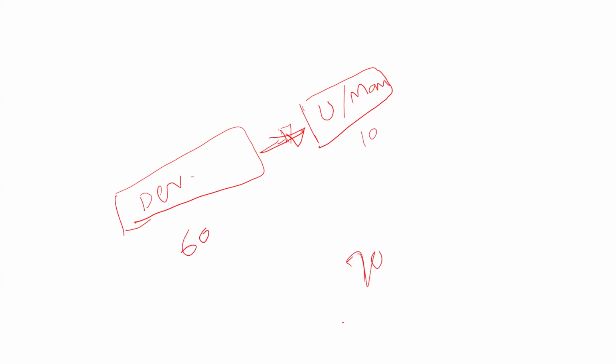And what he says is that I know that before development you can't start doing the user manual, but what you do is try to do it as late as possible. Maybe start it here. So do it with a lag. He says don't start it on the 61st day. Try to start it maybe on the 50th day. So there is some overlap.